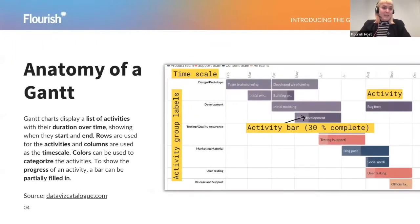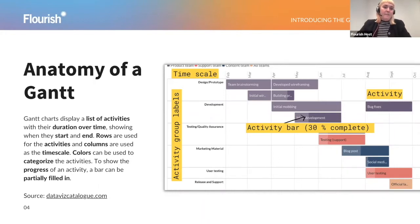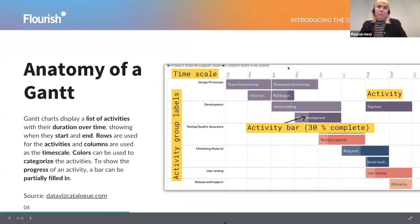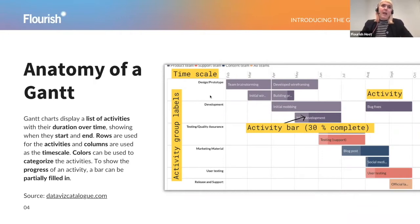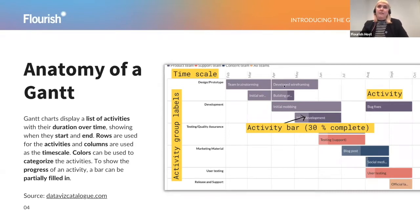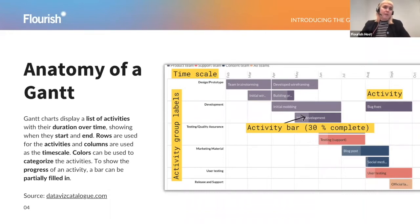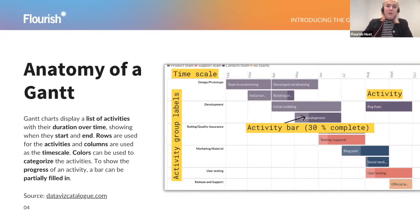Next, we're going to look at the anatomy of a Gantt chart, so the different parts of the chart that will stay the same no matter what kind of Gantt you're creating. Basically, it's always a list of activities over a certain time scale. The time will run across the top or the bottom of your chart normally. In this case, we can see the time scale is months from February until October. And then in rows, we can see activity groups. The activities themselves are shown as bars, which can be stacked if they're happening at the same time. We have an activity bar that can be partially filled to demonstrate the progress that has been made.